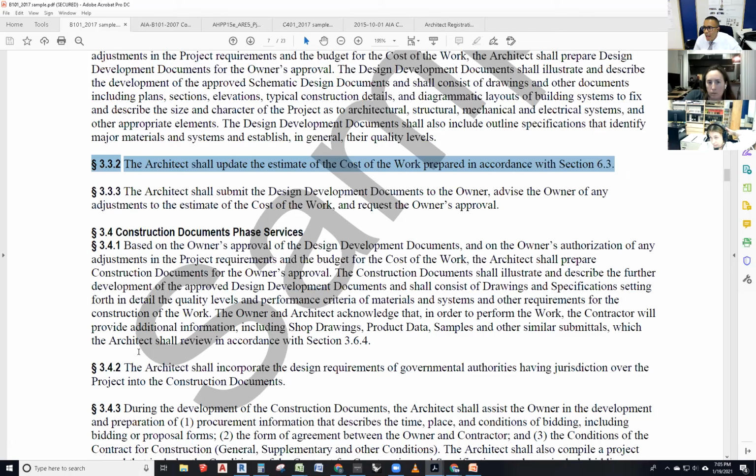So they've got to either say nope, you adjust your drawings. Now, if the owner wants to say nope, I'm not paying $500,000 more, you architect adjust your drawings. What do we do? Here, right here, very early, before we even do construction documents, because we haven't moved to construction documents, the owner says $5.5 million is not cutting it for me. What do we do? Miranda? We revise our drawings to suit their budget.